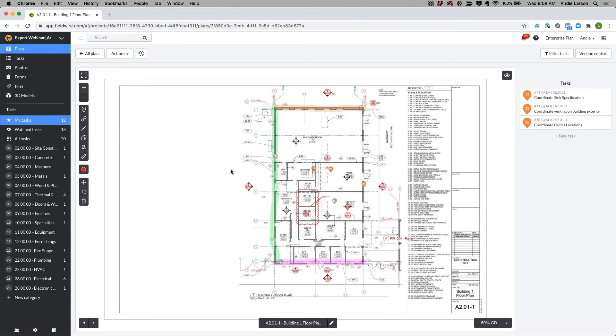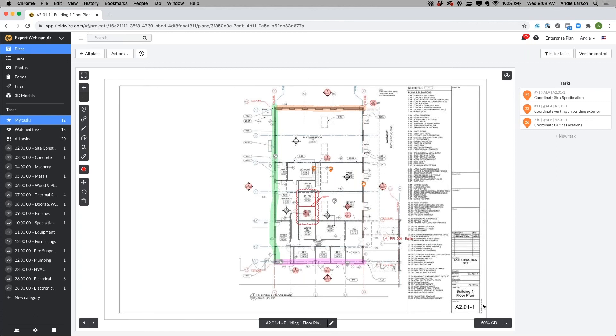The last thing that I'll do with this piece of information of the sheet number is it'll recognize when you upload new sheet numbers. This being said, if you're in the design phases of a project and you have already done 100 percent DD and now have your 50 percent CD set, it's going to recognize this drawing number and confirm with you that this is in fact a new version. When it recognizes this number and you confirm that it is a new version, it's going to automatically slip sheet it.